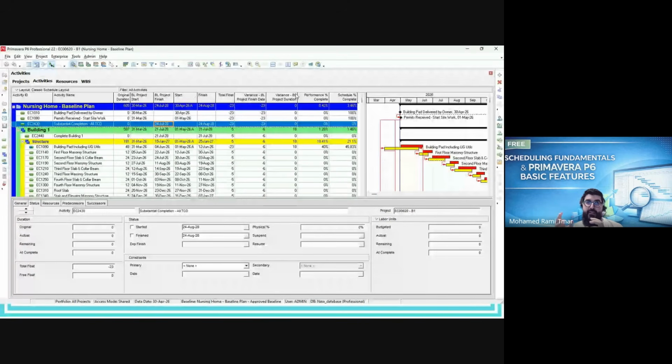And these activities are not impacting your contractual milestone. And one smart team leader, instead of receiving a complaint from the sponsor and from the client that the progress is negative, will start and prepone those activities. Even if they are in the future, he will start working, since he can create the work front.